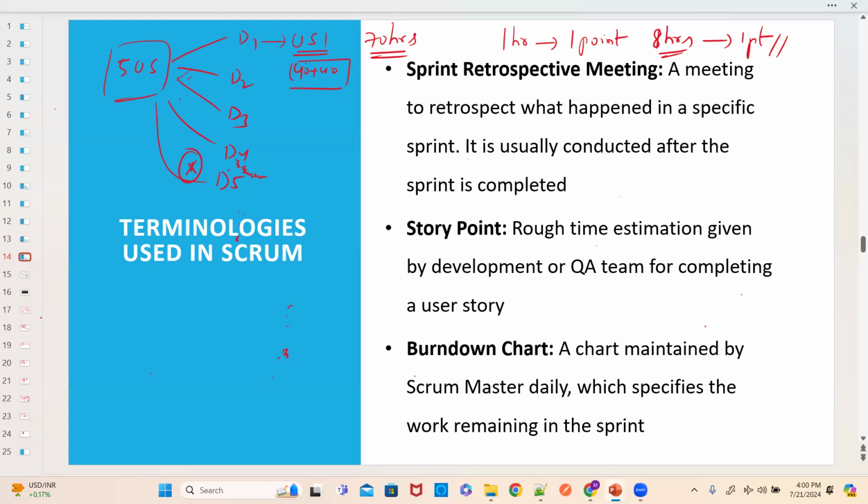See, obviously, a user story will have some subtasks also, right? For example, I told you, a system API should be delivered to the Dev1 QA environment. What are all the subtasks I can create? I can create design, then implementation, then unit testing, then deploy. 4 subtasks are created. Whenever a subtask is completed, for example the design subtask, you mark it completed. Then the second task completed. That way they can progress. Actually, they can monitor also. Exactly. Okay.